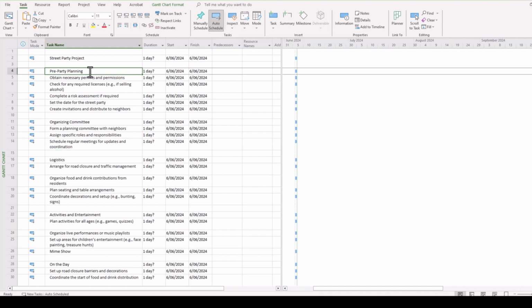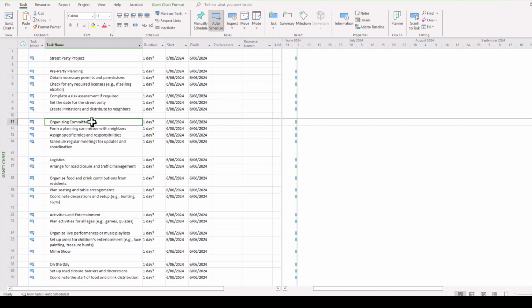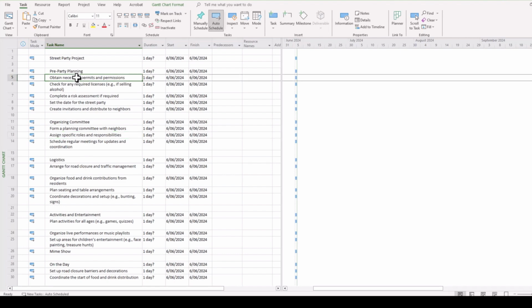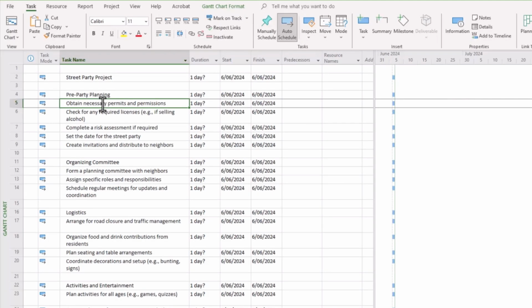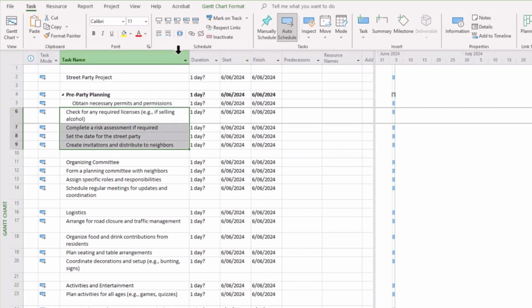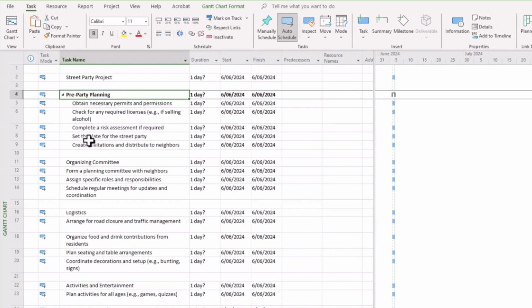For example, our heading tasks or our task summary line items don't really stand out. So what we can do is click on the sub or lower-level task, and you'll notice here we can indent task. We can do it individually, or we can do it as groups like so. And you'll see straight away that our summary heading is in bold, and it reads a little bit more like an essay, doesn't it? Because as you go through a written piece of work, it has headings, so we can do the same with our project schedules, and this will make it a lot easier to follow.